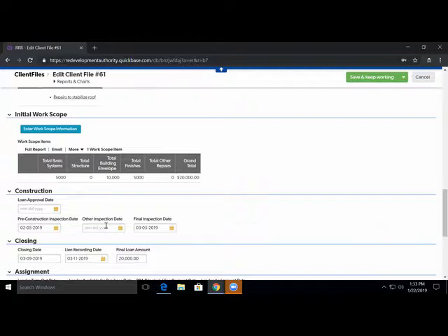Okay, thank you. I just wanted to talk about the draws. So my impression was, Jane, what you just said, that I think it's a 30% draw that's available if the project is over $10,000. Yes. I don't believe we're cutting checks at different times to different contractors, right? I didn't think we were doing multiple draws in that way. I thought it was up to one draw to get it started. So at closing, there's a 30% draw if necessary. And then once all work is completed, there's a final draw.